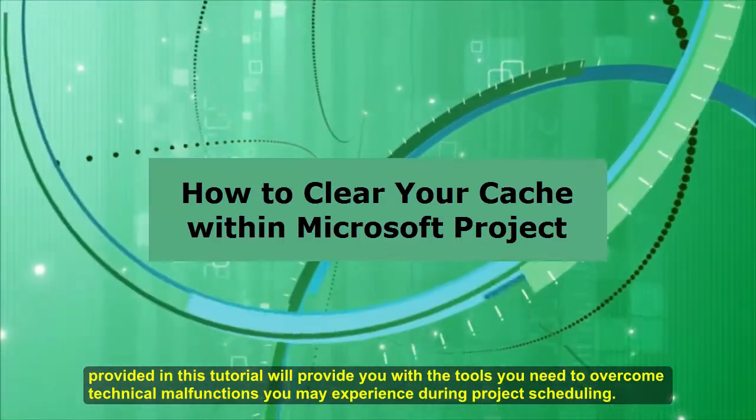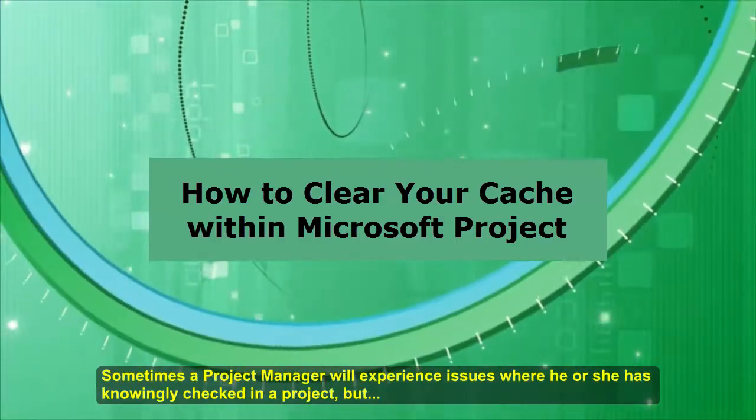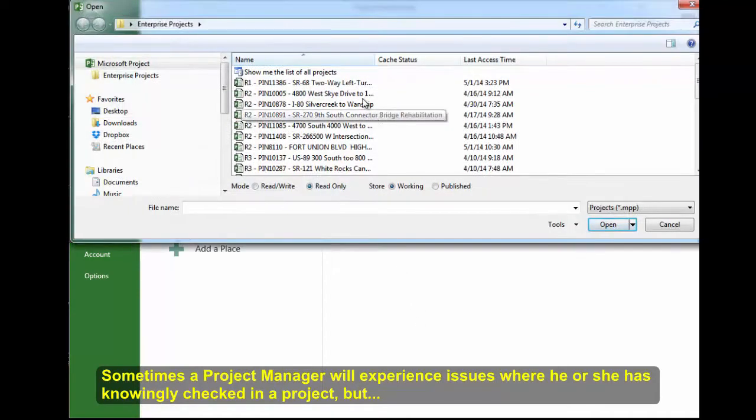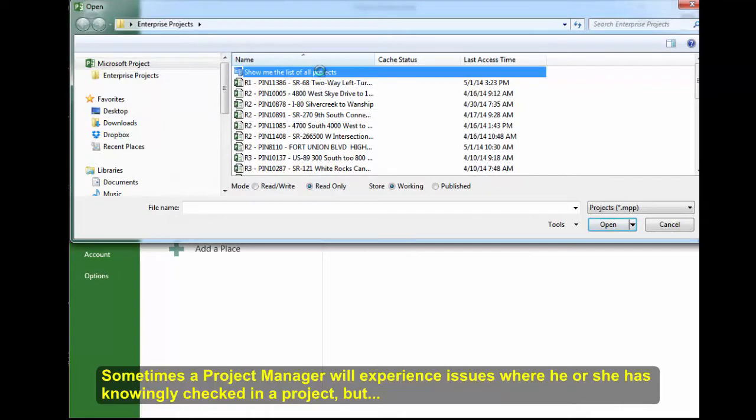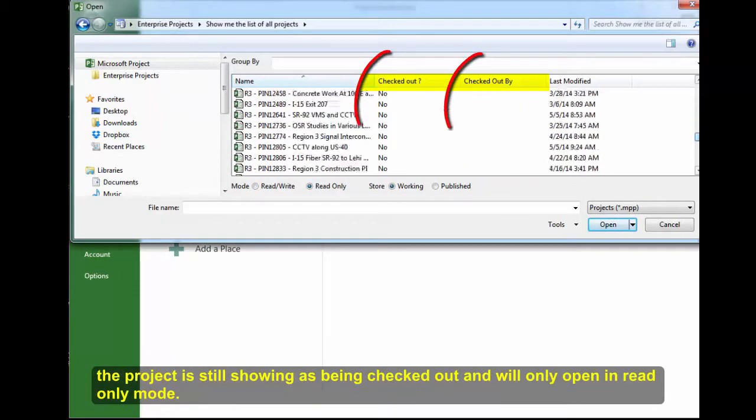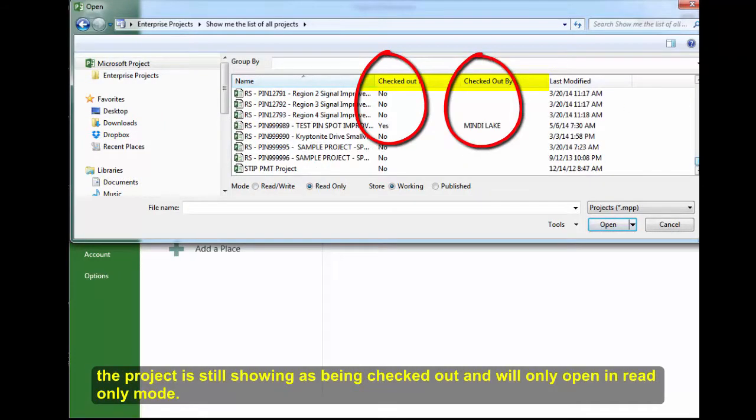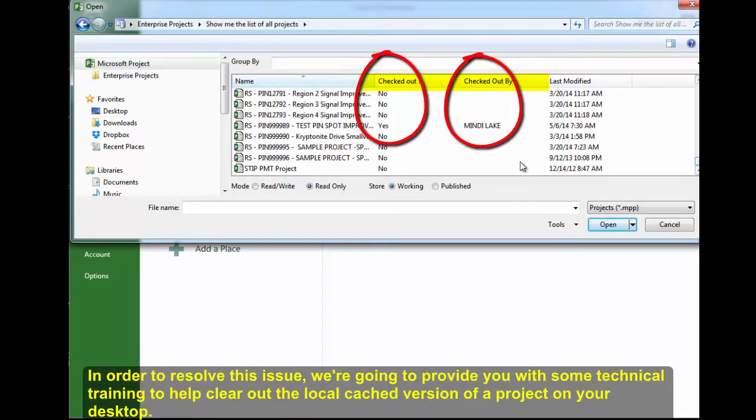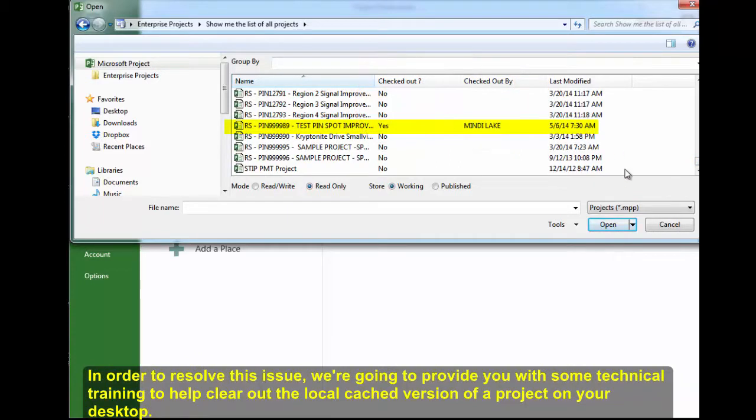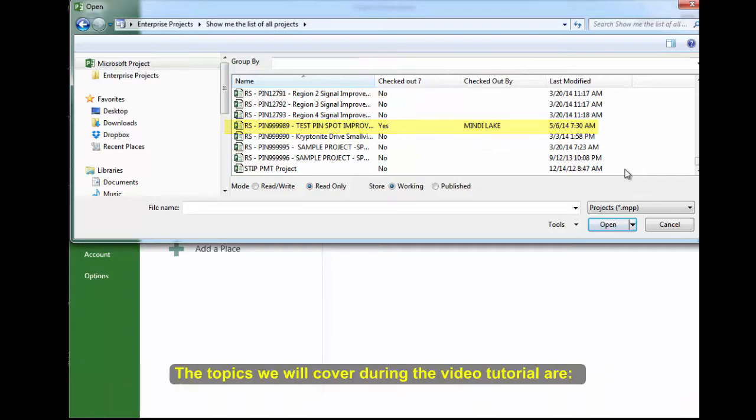you may experience during project scheduling. Sometimes, a project manager will experience issues where he or she has knowingly checked in a project, but the project is still showing as being checked out and will only open in read-only mode. In order to resolve this issue, we are going to provide you with technical training to help clear out the local cached version of the project on your desktop.